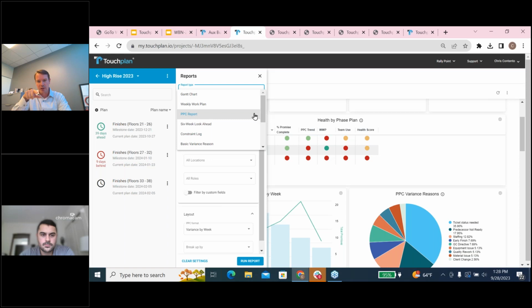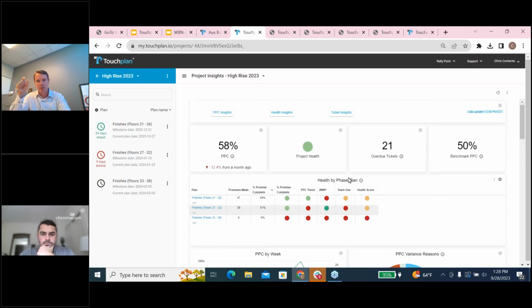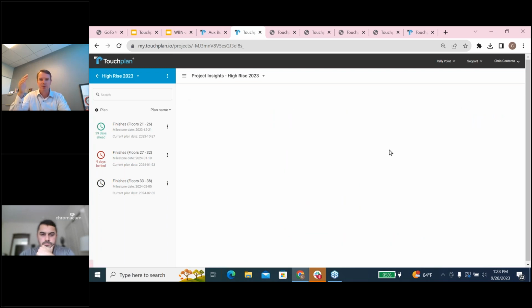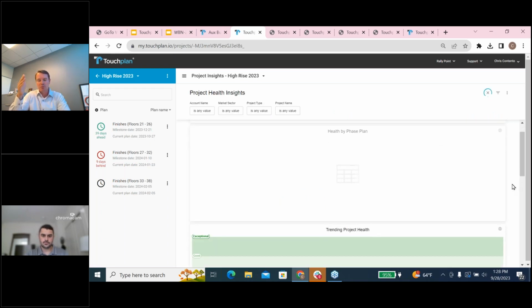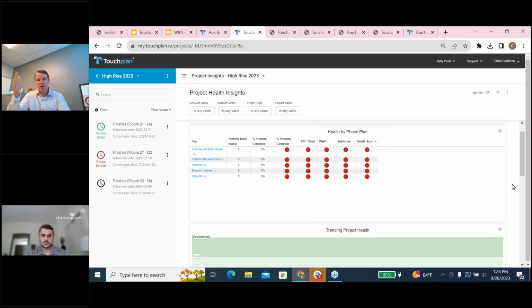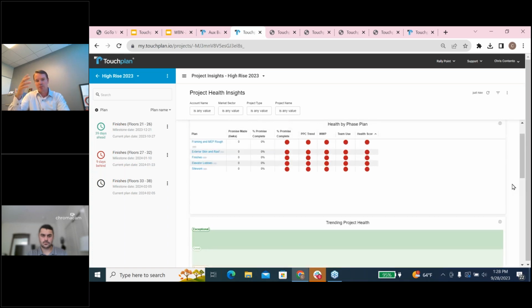And then the same thing when you talk about some of the health, because we had identified, for example, our fire marshal inspections. If those were constantly moving, that would show a low percentage, and that's an indicator of, hey, we're failing inspections or we're not ready for them. Those kinds of metrics are really important, because our relationships with our inspection teams are critical for the success of a project.